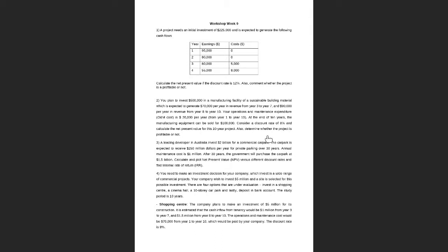Also, when you're doing the net present value, be mindful of whether the net present value is positive or negative, because that is an indication of whether the project is worthy of investment or not. As I saw in the chat section, you guys found the correct values but missed out on this sign, Victor. So just be mindful of this sign.